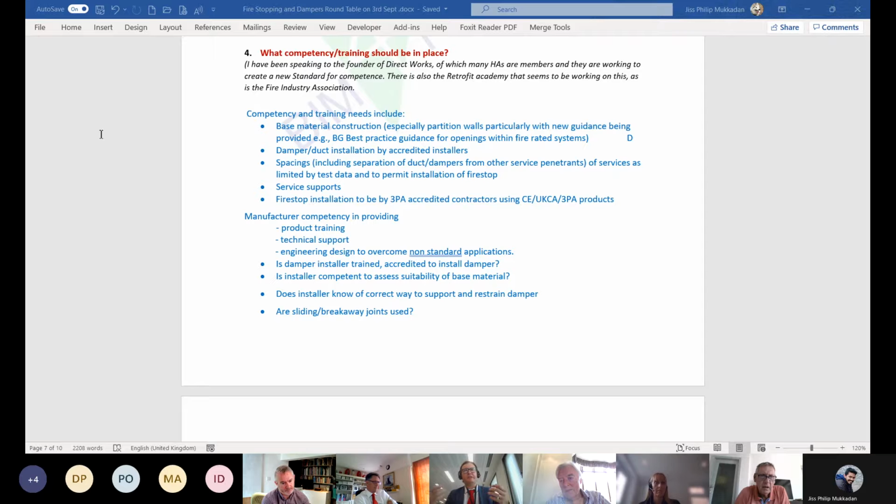I think there are 2 things you need to do. One is that traditional procurement, and this all comes from the client side as well, is that you'll have a PQS, no disrespect to them, who wants to get the cost plan down to say £400 a square foot for resi, or maybe 350, whatever they're looking at. Then it goes out to the market for cost advice. But all the time, this job's going through planning with no detailing involved.